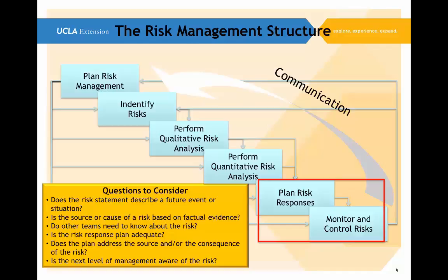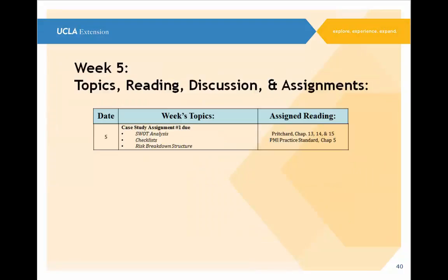it depends on the sensitivity of the project to risk, and it depends on how long the project is, how often we might actually sit down and take a look at all these risk responses and analyze them and see which ones may have gone away, which ones may have gotten worse, which ones may have gotten better, and identify any new risks or anything of that nature. And from that point of view, we will continue that process and continually work through this cycle of processes for all of our risks.